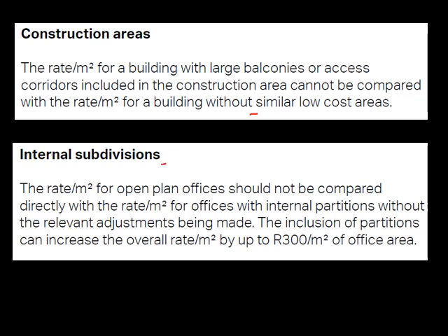Internal divisions, subdivisions, your internal walls. If you've got an open office development, you can't compare that rate with a new development with a lot of individual offices built into it. Obviously, you have more brickwork, you have more paintwork, more aircons that you have to put in, less centralized installations, etc. So those are the other things that you need to look at.